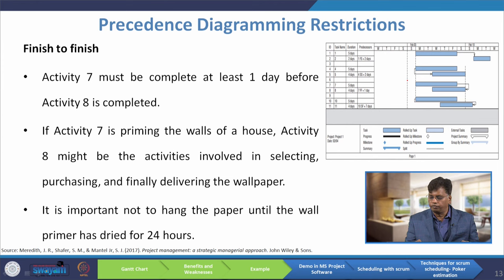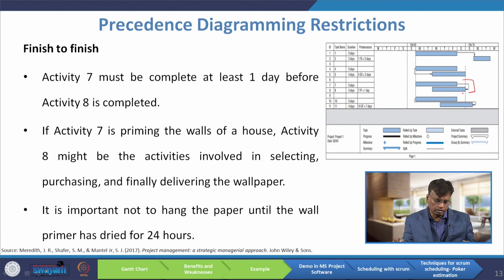The next relationship is finish-to-finish. Activity seven must be complete at least one day before activity eight is completed — we refer only to the finishing of these two activities. For example, if activity seven is priming the walls of the house, activity eight might involve selecting, purchasing, and delivering the wallpaper. It is important not to hang the paper until the wall primer has dried for 24 hours.